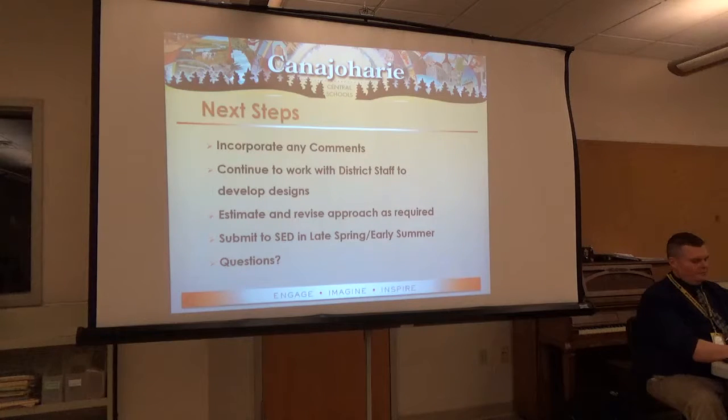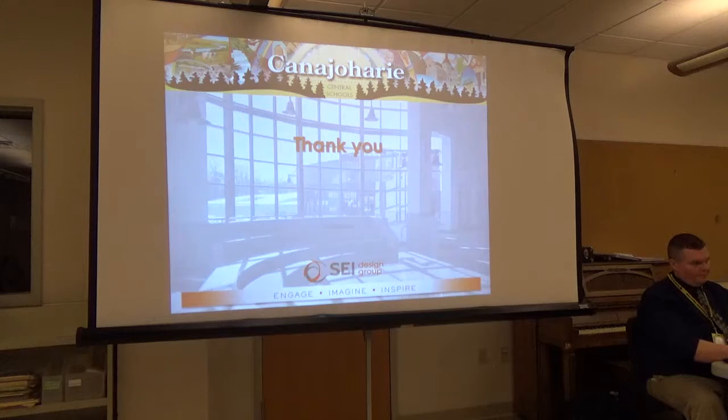But I wanted to get that drafted and input into SED as a final submission so we could get that thing moving for June. And then sometime mid-April, we will estimate phase 1B, where we are with our drawings, combine that with our phase 1A estimate, and report back out to you as to where we think we stand. And once 1A is bid, we'll know where we stand partially. And once 1B is bid, we'll know exactly where we stand. So that's a good thing. So that's it for next steps and where we are right now. Does anybody have any questions? That concludes from the audience.